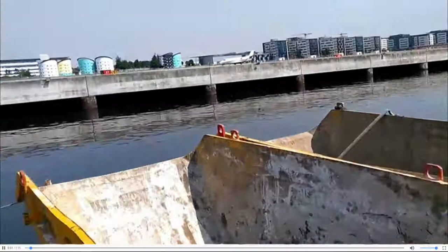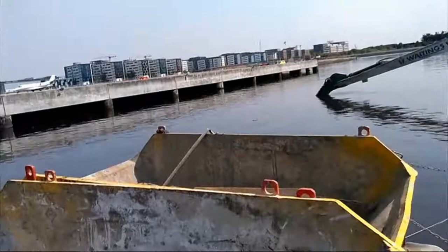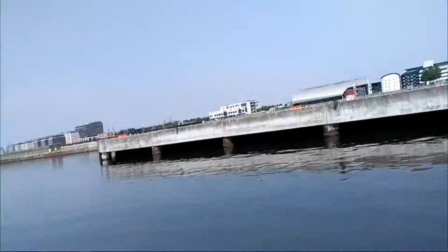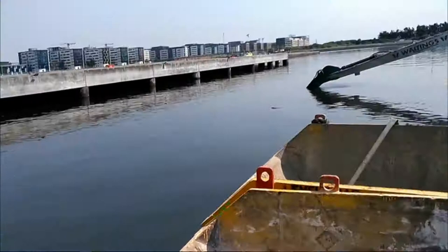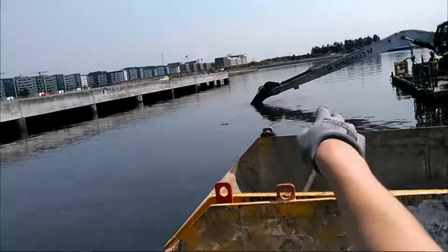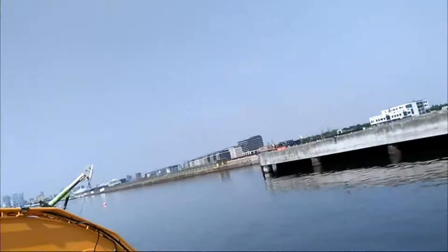Okay. So, we're on barge one, working on P712. Current status is we scraped down to 2.4 metres. The toolbox talk this morning that was conducted was on the weather. As you can see, it's very hot, so the guys are taking regular breaks. Plane just about to take off. We're still maintaining the 27-metre offset from the taxiway centre line. You can see the boys in the water there. They've moved back a bit just because of the slight flotation, so we know we're still within that. The runway 27 is in use at the moment, so we're still using a turning circle.